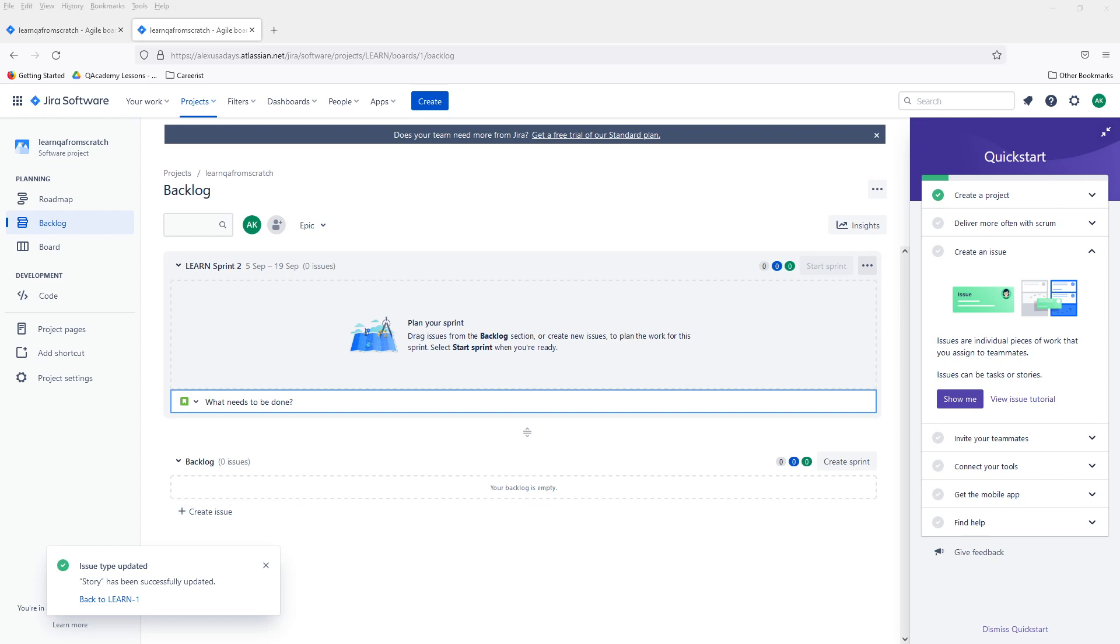And then after that there is sprint retrospective and discussion on how it went, what was the strong side, what was the weak side, was the estimate correct, whether any wins or gains. So essentially it's an ongoing thing where there's a discussion of the process, how it is going, how it can be improved. And then the new sprint starts and the same process all over again. So new stories selected from the backlog, they're estimated how complex they are, everything pulled in by priority, those stories are part of an epic, and then work is completed, you test, developers fix bugs, you test it, another release or just maybe it sits in a test environment or sandbox or some pre-production environment waiting for a big release like maybe released every three sprints.